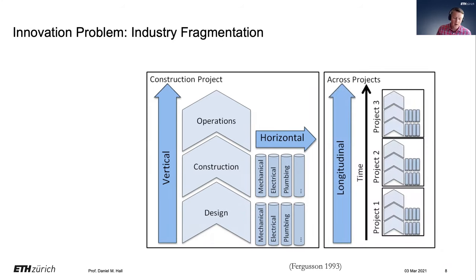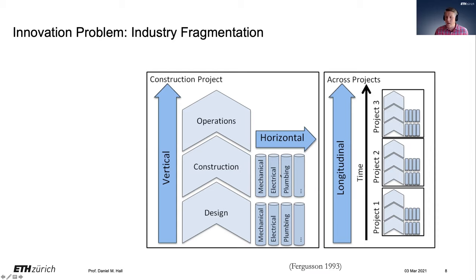Finally, we have longitudinal fragmentation. In traditional construction, we come together on a project-by-project basis and remake the supply chain every project — we never have continuity between projects. Even if at the end of project one we learn all the ways to cross-subsidize and develop new products, we never really work together with the same partners again. This was called a 'learning disability' that slows down innovation diffusion.